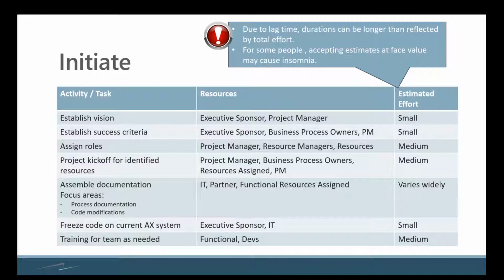So that's something to understand: the lag time between each of these processes that you start going through and identifying, for example, the assignment of roles. If you pause with that and then don't continue with it, the duration in terms of the work effort to re-pick that back up and come back up to speed can really vary and cause, even for us, for example, billing issues, because it takes more time now to do this.